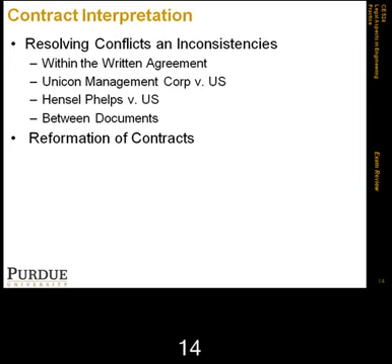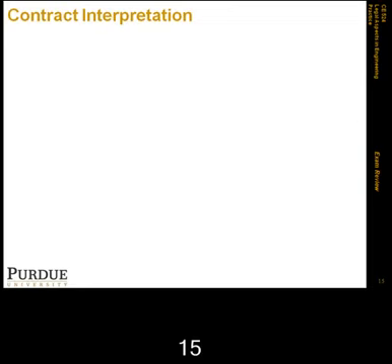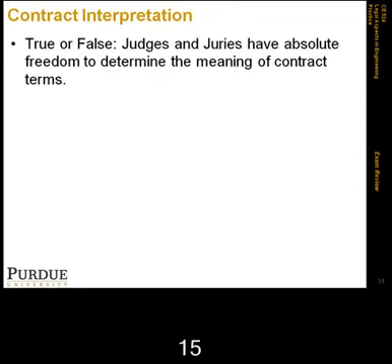the reformation of contracts should be justified. It's mostly justified in cases of joint enterprise in experimental situations where neither party assumed a particular risk, and the interest of the government, we're talking about federal procurement here, where the interest of the government is in the process, not just in the product itself. So this was the topic of reformation of contracts, and the questions we have here from part 1: true or